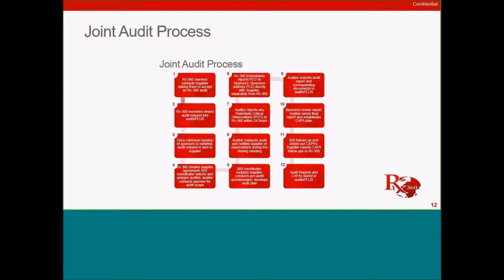5. BSI coordinator contacts supplier, conducts pre-audit questionnaire, develops audit plan. 6. Auditor conducts audit and notifies supplier of the observations during the closing meeting. 7. Auditor reports any potential critical observations to Rx-360 within 24 hours. Rx-360 immediately reports PCO to the sponsor. Sponsor addresses the PCO directly with the supplier separately from Rx-360.